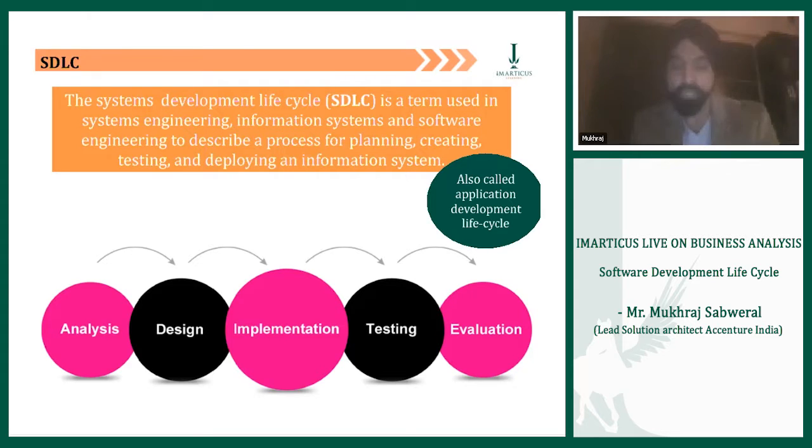So Rajesh needs those stakeholders to map the entire process in order to evaluate what the current effort behind running that process today is, what the related cost is, why this kind of automation is required, and if it is required, at what points of the process it's going to be done, unless he's automating every single process step itself. That's what we call analysis.